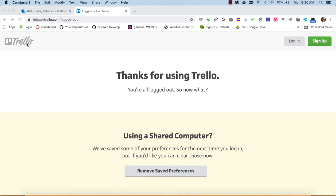These are basically boards where you can create lists of to-dos for a project and move them from one column to another. The columns represent things that are to-do, things that are in progress, and things that are done.